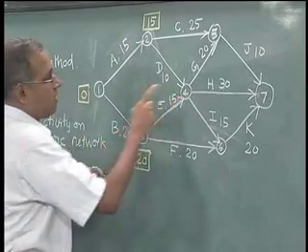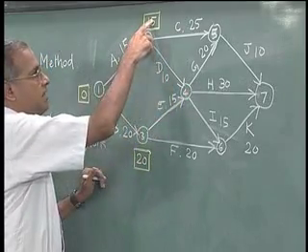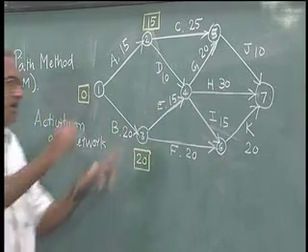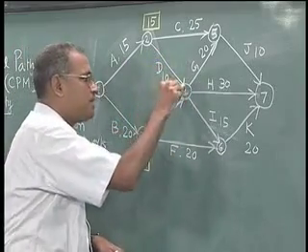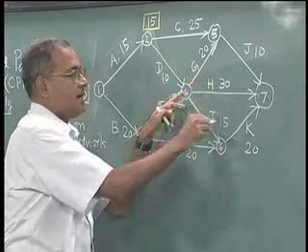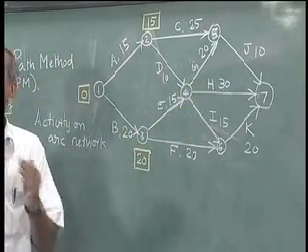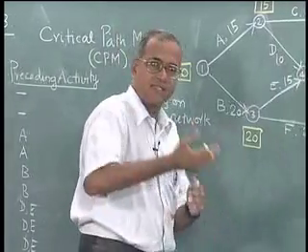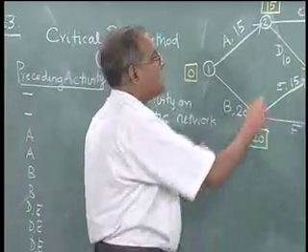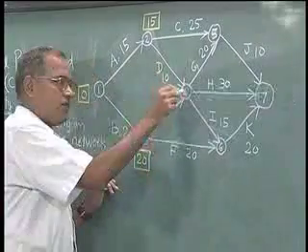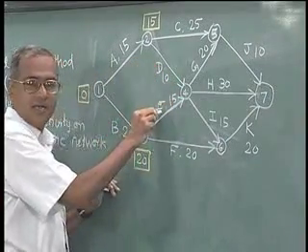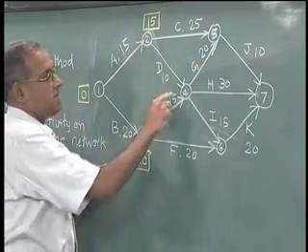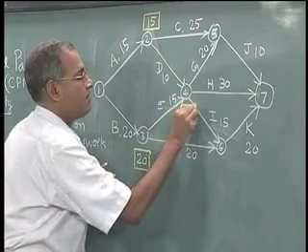Now, when we come to this 4, earliest it can be completed is 15 plus 10, 25. Here it is 20 plus 15, 35. But now here 4 represents an event where actually both these are completed, so that G, H and I can begin. So, it is not about when earliest can I reach 4, it is more about when latest I will reach 4, such that latest in the sense to minimize that late quantity. When this 4 indicates that the event which symbolizes the completion of both D and E, then the label that we put here should be the maximum of 15 plus 10, 20 plus 15. So, we get 35 here.